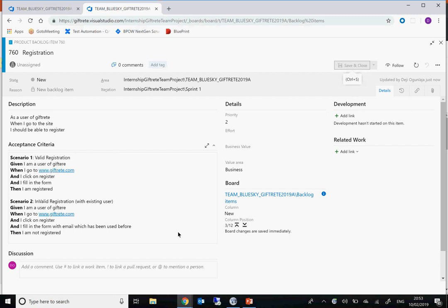Most teams that I have worked with will use a Fibonacci series, that is 1, 3, 5. Everyone will come together, the BA, the developers, and also the testers, and they will ask everyone what is the effort of this particular story.